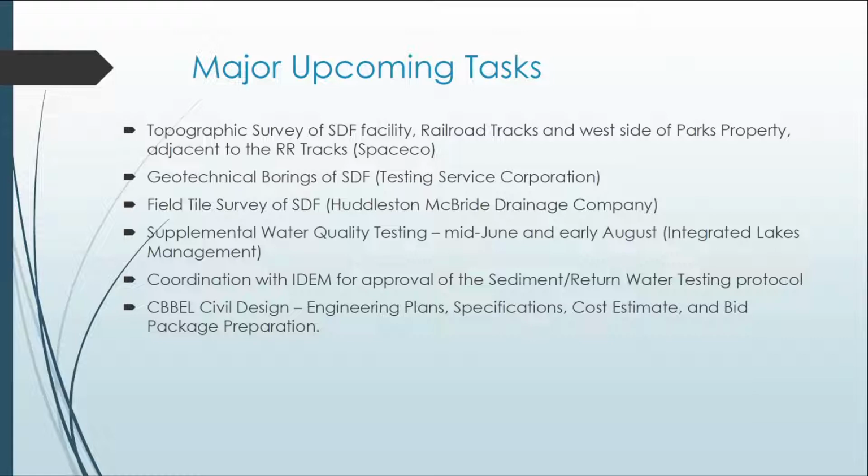We want to know how porous the ground is underneath that basin, how much water we may lose out the bottom of this, because that'll help us pump. Even if it's a very leaky soil substrate, we'll be able to pump even more slurry into the basin at a faster pace. We're going to do a field tile survey of that SDF.